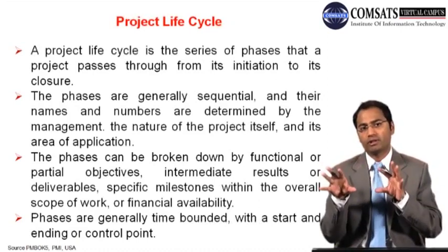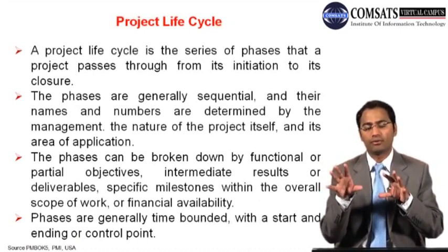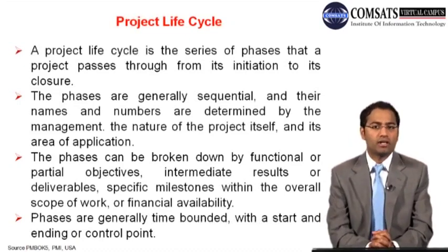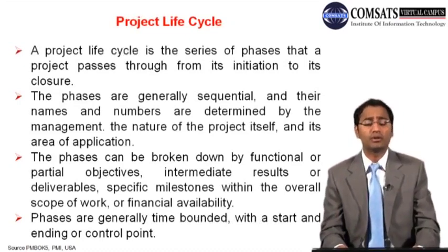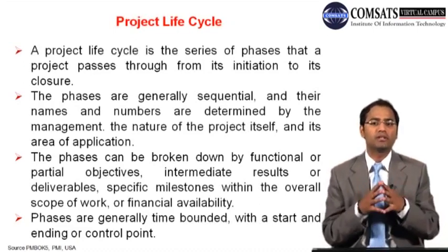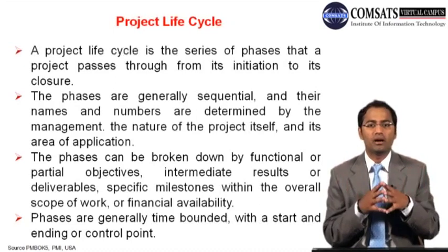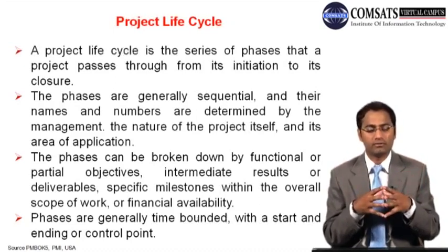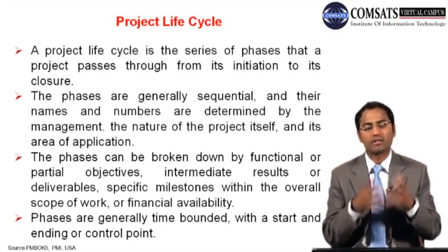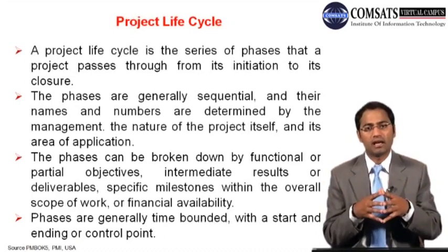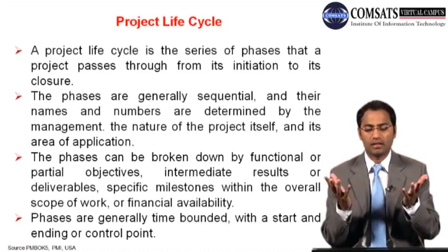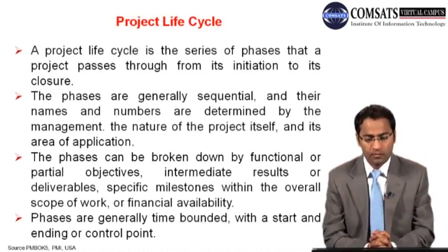So the nature of the project is a very good force, or major force, which dictates the number of phases in many cases. But the organization is also very important, and at times organizations have their own processes and assets. One example is available with the roads sector in Pakistan. They have divided their project into seven different types of phases, and they call them earthworks, bases and sub-bases, asphaltic works, structure works, erosion works and ancillary works, and there is a seventh phase that is having some contingency planning.